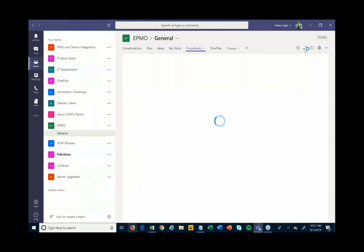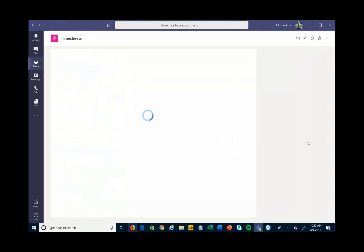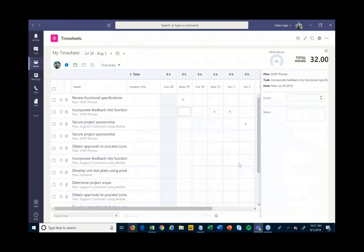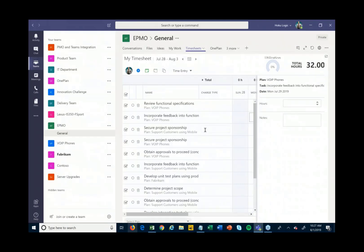If I need to fill out a timesheet — every week recording what I worked on and how much time I spent across different projects and tasks — I can come right into my Timesheet tab in this team, put in all the different time I've been working on these items, and at the end of the week hit Submit to route it through an approval process. That time then flows back into the project schedules and can be translated into cost if needed.